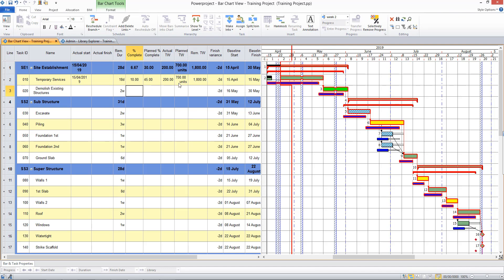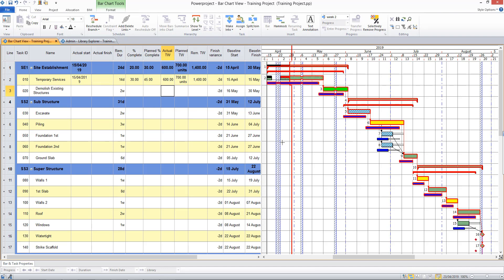Or, in terms of work, I should have completed 700 units. Let's imagine that I've only completed 600 units. That's telling me that's 30% complete. My line's still dragging a little bit to the left, and my new progress section showing in red on my task there.